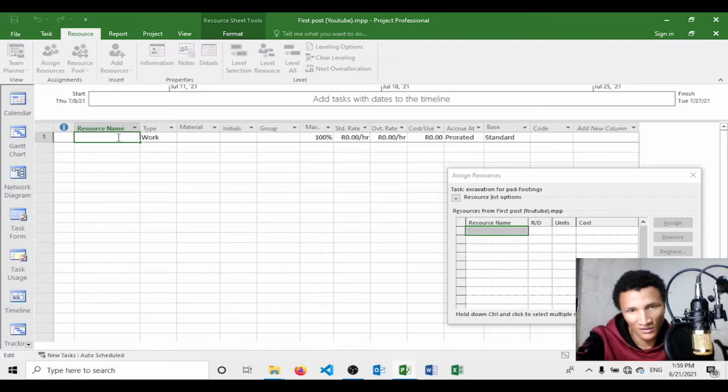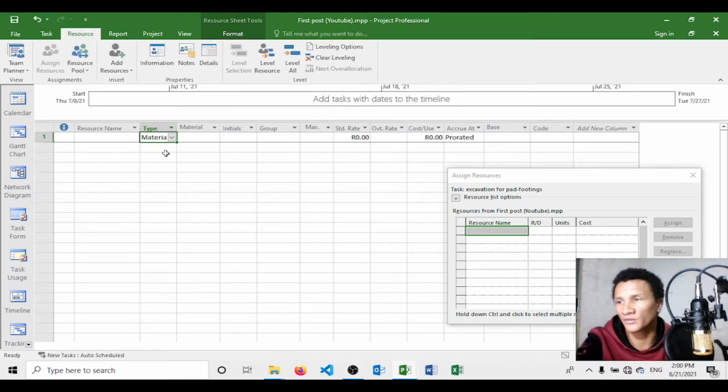One is your permanent employees. The other one is your employees that have a contract, but it's basically paying your employees. You pay them a per hour rate. Then you have your equipment that you're going to pay a per hour rate, and then you have your plants, which is your machines, that you're going to pay a per hour rate. Now then you have your material. Your material is like concrete, toilet pots, anything that's material related, and usually it's going to have a standard price.